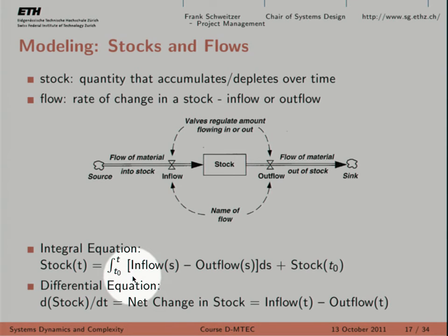An outflow could be considered a mistake done and that you thought that you have done something wrong. Yes, for sure. If you have a stock variable which is called work done, but not checked for quality, and if you discover a mistake in this, when you check for quality, you discover some task was done wrong, then of course this outflow, you take this task, you put it to another stock variable which may be called work to be redone, right? Because it's a faulty thing. So this would also be an outflow. So yes, discovered mistakes could also be an outflow.